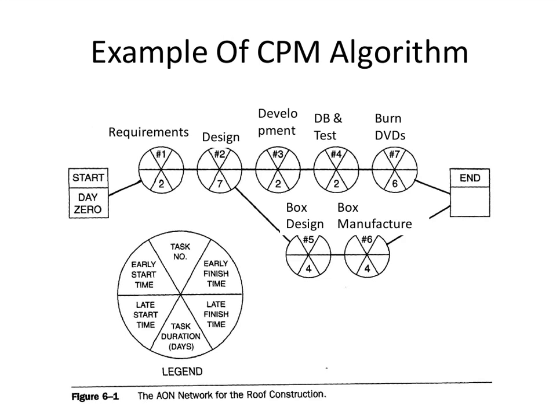So what's quite common is that you have a shifting critical path. And this is one of the jobs of the project manager, is to keep track of, okay, where is the critical path at, and are we forming a new critical path so that we got to ride that one really carefully. The critical path is the one that you got to stay on top of.